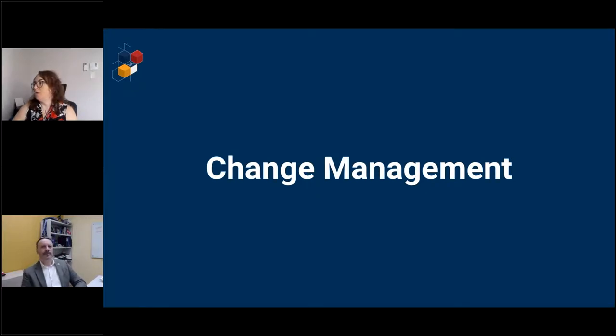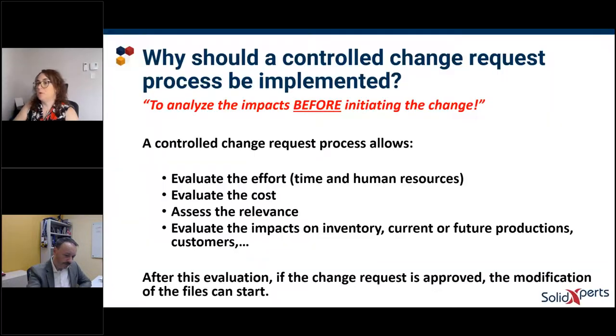All right. Okay. So the next slides will be about change management. Change management is really important in document management software also. So let's go with the first question. Why should a controlled change request process be implemented? We know that any change has impacts. It could be an impact on your human resources, some financial impacts, and maybe any kind of various minor or major impacts. So it's really important to frame the change process so that these impacts are analyzed before initiating the change.